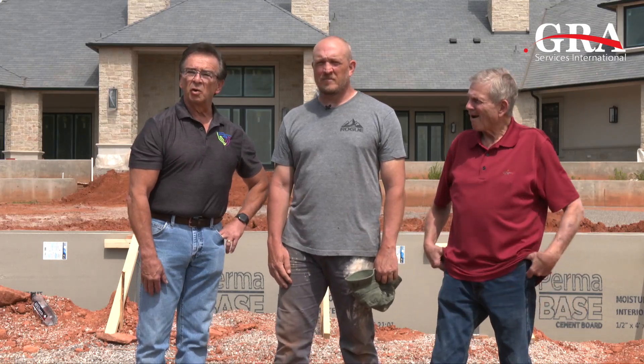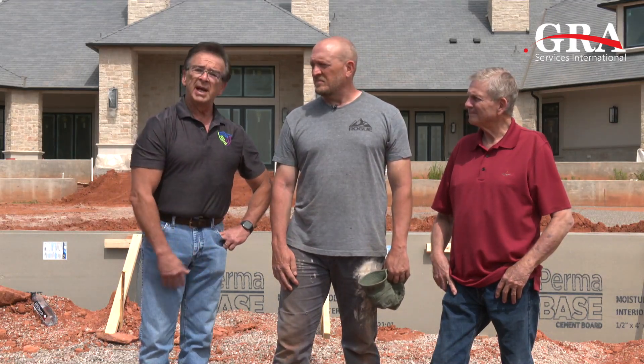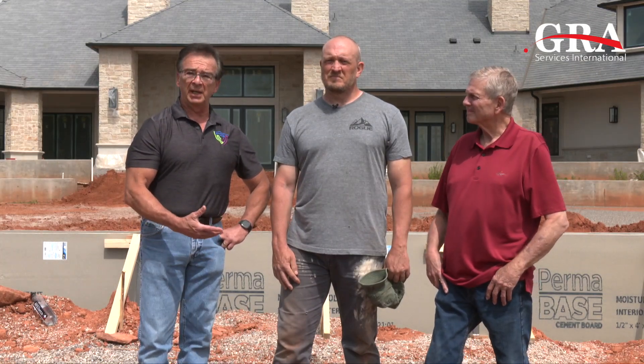Doug White, Sugar Oaks Development. The reason we're here today is because Sugar Oaks Development is more on the progressive side. We do everything from building houses to major renovations, which is where we met originally. What we wanted to look at here was a different way than the traditional methods of building a retaining wall. After meeting Doug and seeing his product, we looked at the cost. The cost of pouring this particular wall the traditional way is about $36,000. We're going to be able to do the same project for about $18,000. So economically it makes a lot of sense. Tensile strength and all the things we've discussed also make sense. So we're excited today to pour this and see the outcome.